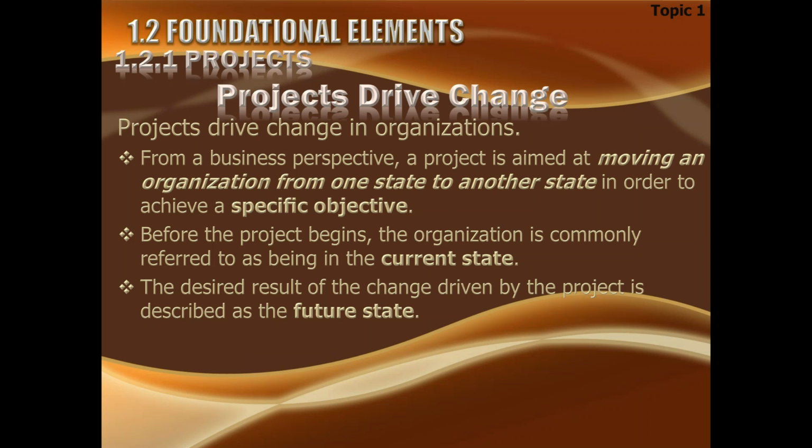Although that issue must be resolved at the spot, it cannot be, because the person responsible for that activity is not empowered enough to resolve it. So in that case, we have an escalation path in the organization. He will escalate the issue to the next higher level, and if they can resolve it, they will resolve it. Otherwise, they will also escalate it to the next higher level.